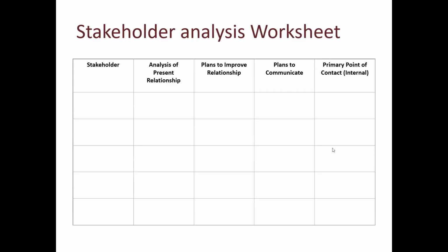Again, if I went to Google right now and wrote Six Sigma stakeholder analysis template, I will get tons of templates. Maybe they vary in the shape, the format, the colors, but again and again, the core is the same. So I need to list my stakeholders here. IT specialist, lab manager, and I'm not listing names. I'm listing titles. Take care. I'm not just listing names. I'm listing titles. So once you are done with listing your stakeholders, you have to have a meeting with him.